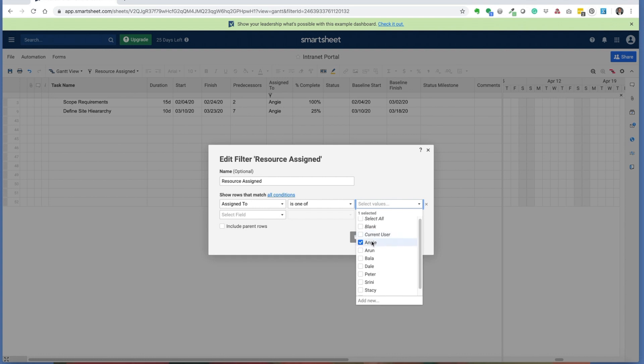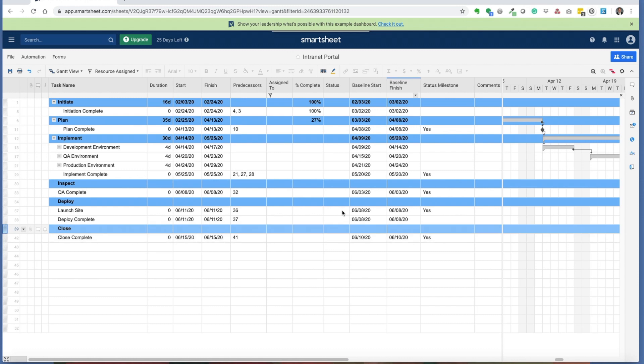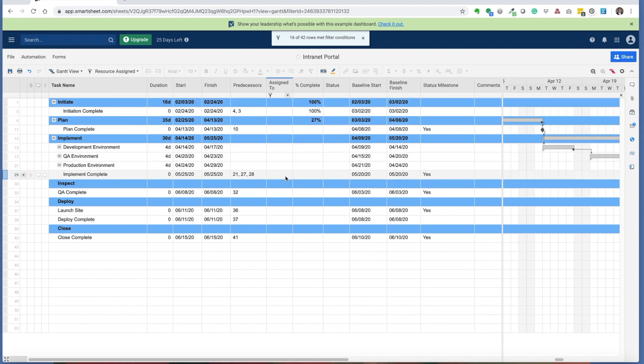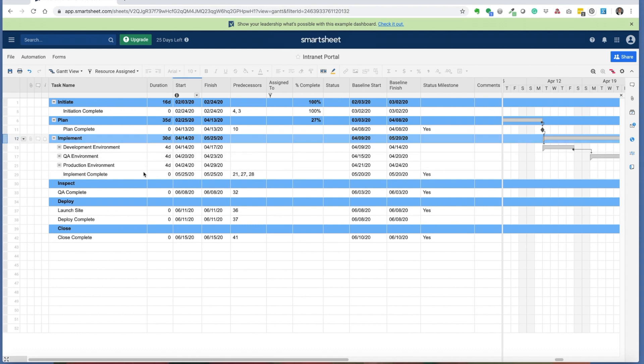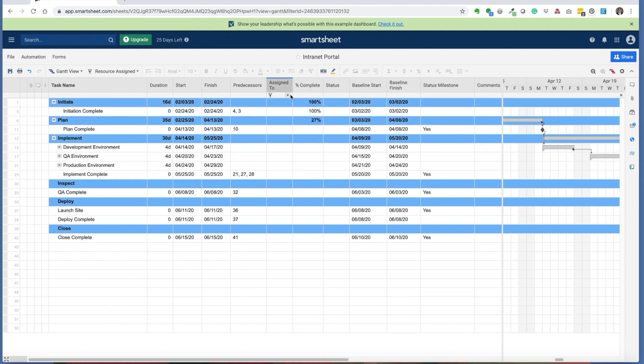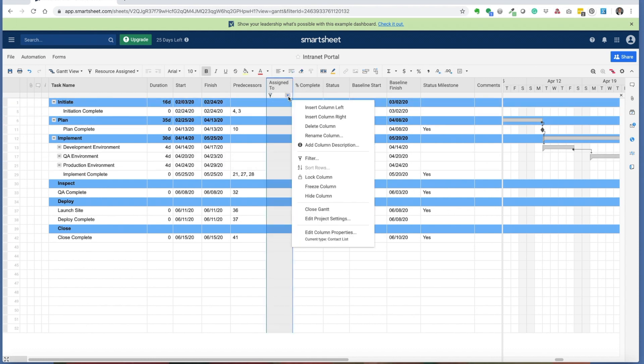You can also look to see where there's a blank user. If there's any tasks that are missing an assigned resource, you can use this to determine who's actually going to be completing those given tasks. Here, what I have remaining are milestones as well as higher level tasks. I'm not as concerned about assigning a resource to those deliverables. So from this view, I at least have the proper resources that are properly assigned.